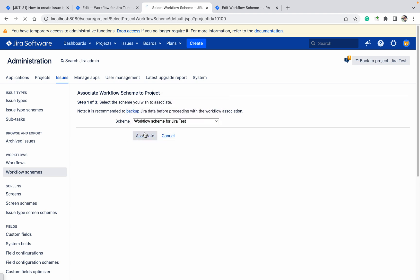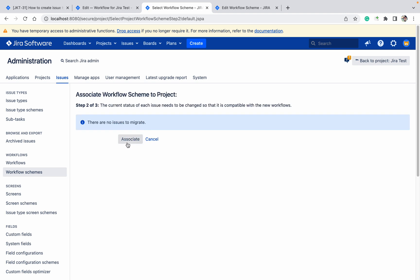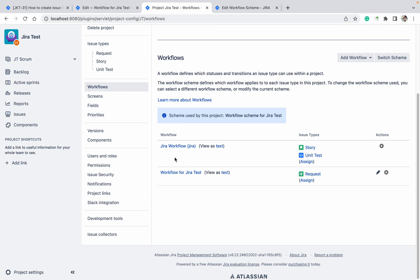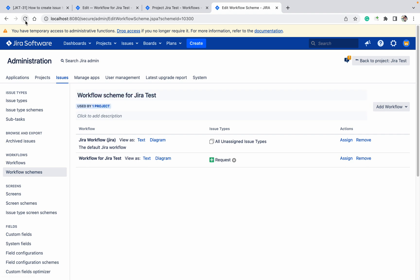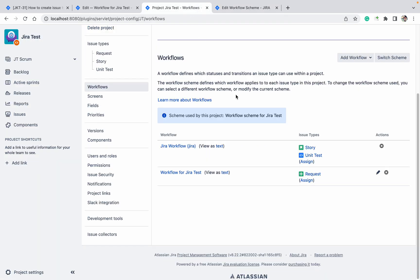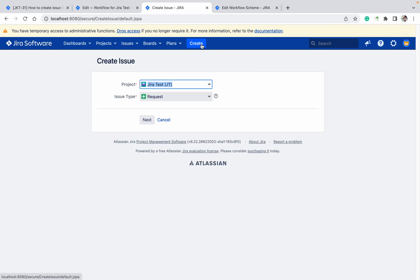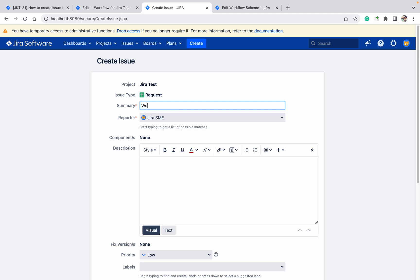Copy the workflow scheme name, go to the project, and click 'Switch Scheme'. Select 'Workflow Scheme for Jira' and click Associate. The scheme is now changed — the project is using the new workflow scheme. Once you refresh, you can see it's used by one project. Now let me create a test ticket called 'workflow test'.